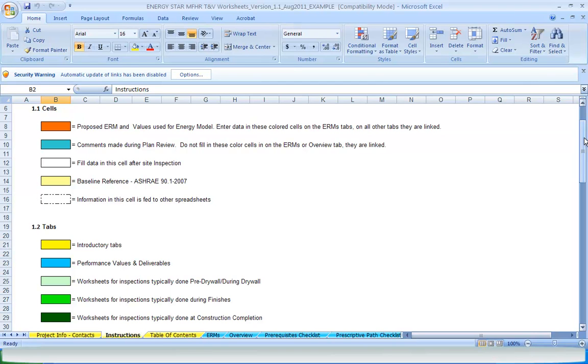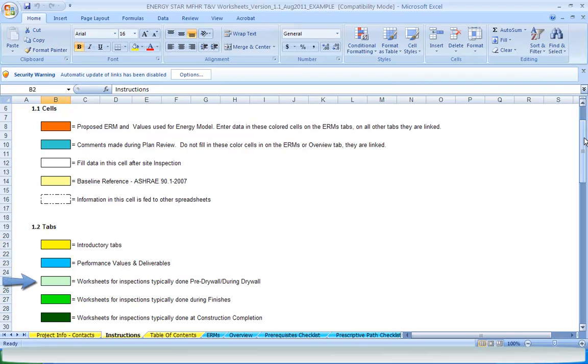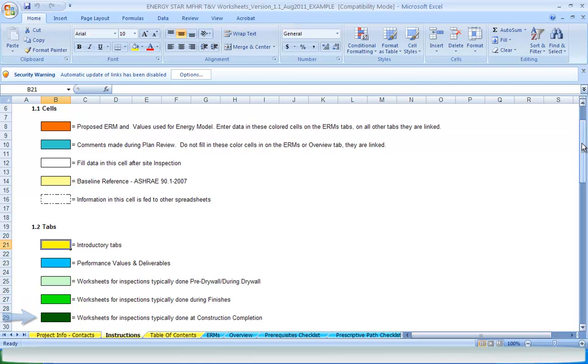The tab colors also have significance. Yellow are introductory tabs, while blue cover performance data and values used in the energy model, as well as deliverables like the prerequisites checklist. The actual protocol worksheets are broken up into three shades of green. Light green are for inspections that typically happen before or during drywall installation. The medium color green tabs are inspections that happen during finishes, and dark green tabs are inspections that happen at construction completion.